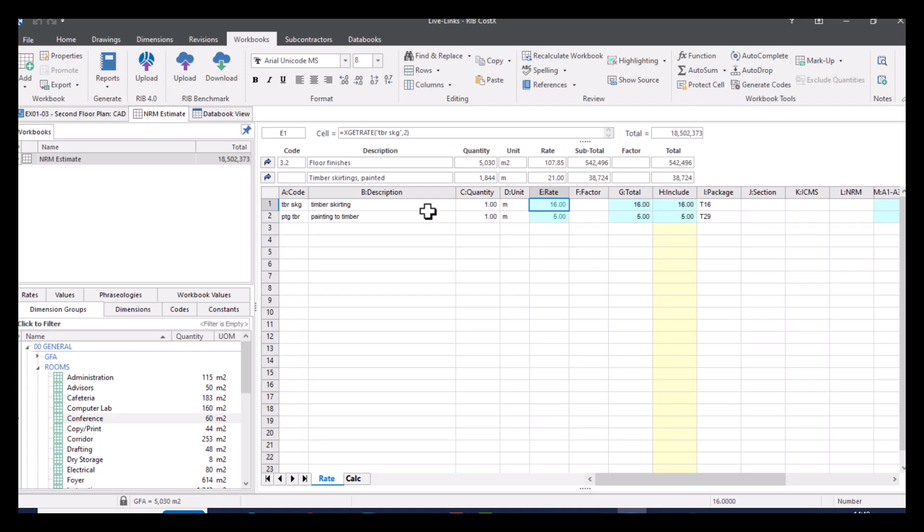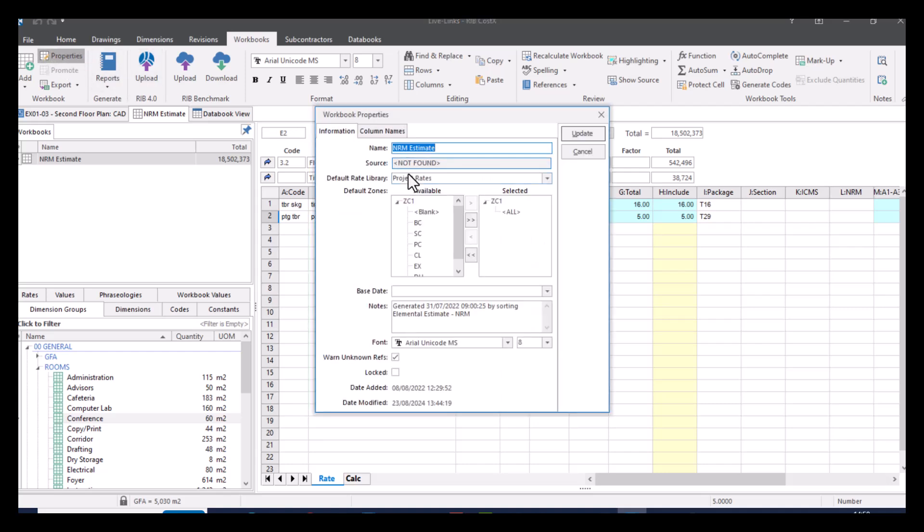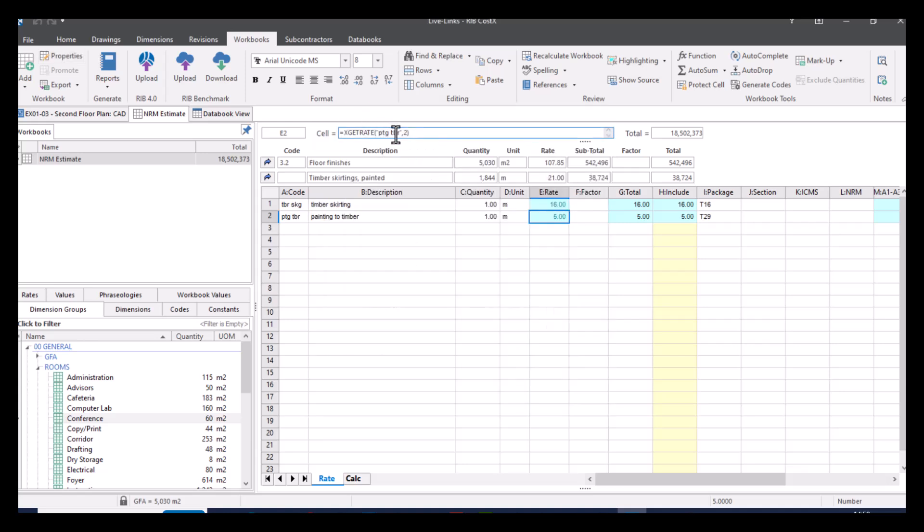So we're going to go down to our skirting here. If I highlight up here, you can see that we've got a custom formula in here. So this is saying get rate, then the rate code and then the rounding of that. We have selected in our properties which default rate library to relate to. So when we type in that code or when we reference that code, it knows which code library to search for. The benefit of having the rate library live linked is that if it's edited or updated, then this will automatically update as well.